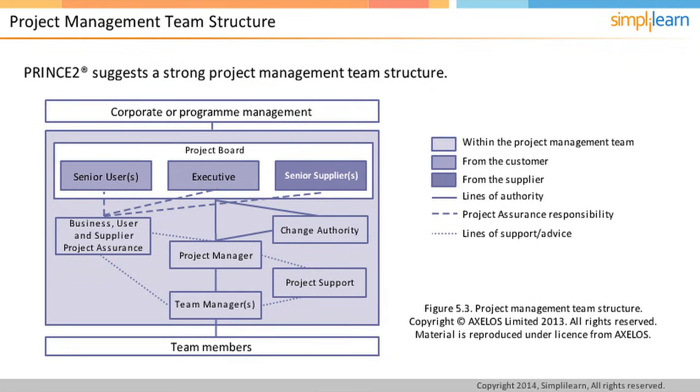However, some of the PRINCE2 responsibilities cannot be shared or delegated for managing the projects effectively, such as the project manager and executive roles. Also, the project manager and project board decision-making accountability cannot be delegated. Let us discuss all the roles depicted in this diagram in detail. From the foundation exam PRINCE2 perspective, you should understand the roles and responsibilities clearly. In the next screen, we will discuss the first role, which is executive.